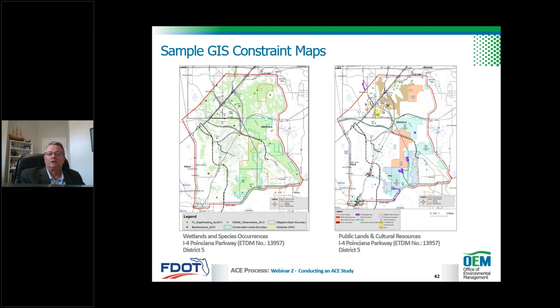You might have a factory or even a big apartment complex. And there will also be other examples of unmapped features that are existing. For example, if you're close to an airport, there's a FAA restriction that's called a runway protection zone, which extends for several thousand feet from each end of a runway to protect the approaching aircraft from obstructions. And so that is an obvious and major developmental constraint on you. So a lot of the identification of what's not on mapping helps as well. Next.